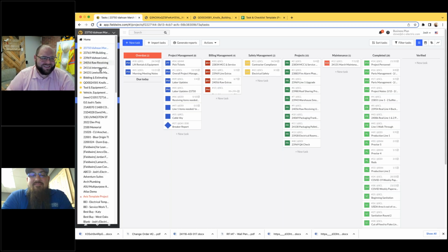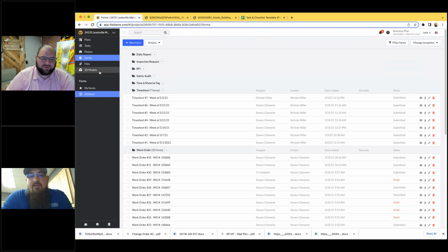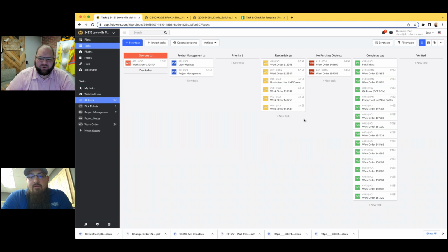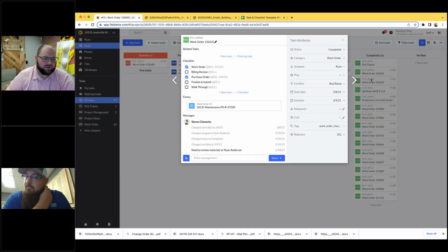That's so right. You had mentioned multiple work orders, and I know we had this one project here that spelled that out. We were able to take a look at these work orders in a little more depth. Can you walk us through your process? Right. So with that maintenance punch list, each maintenance item had a separate work order with a separate purchase order for its own billing. So when you have 30 plus work orders in a 2-week span, it can be difficult to track and difficult to maintain.